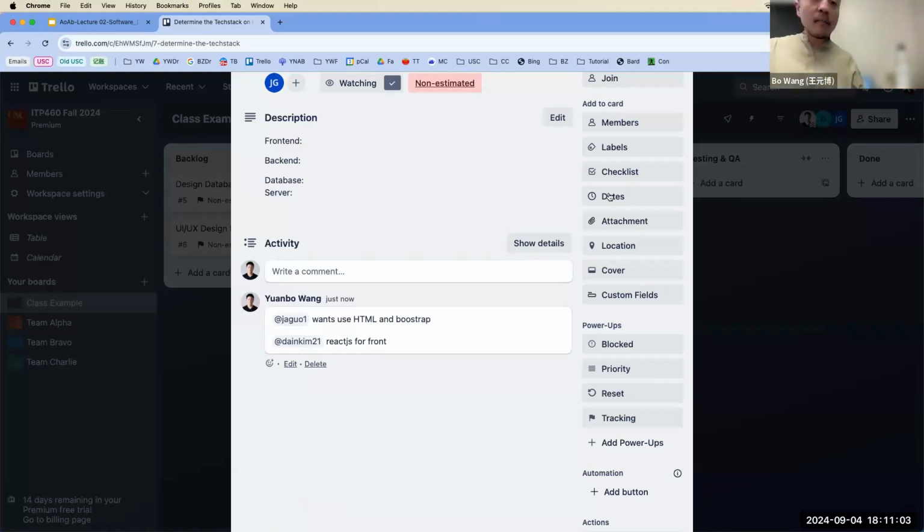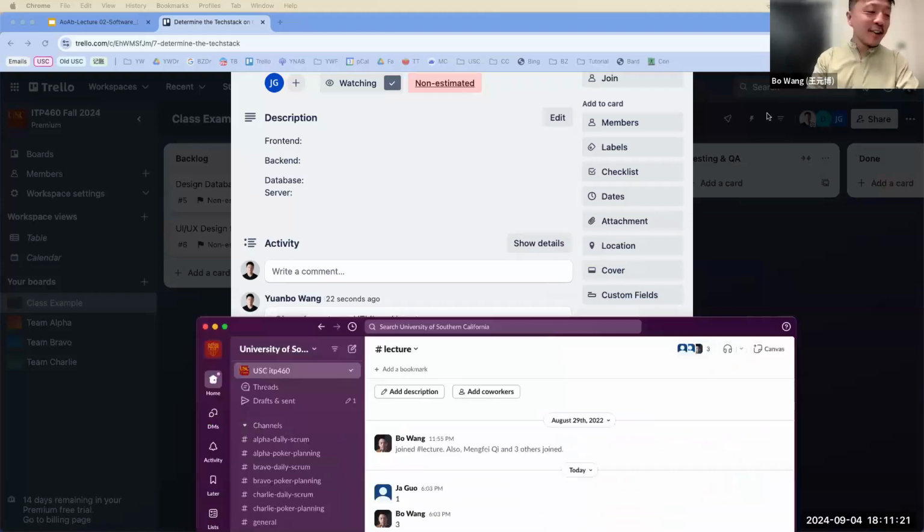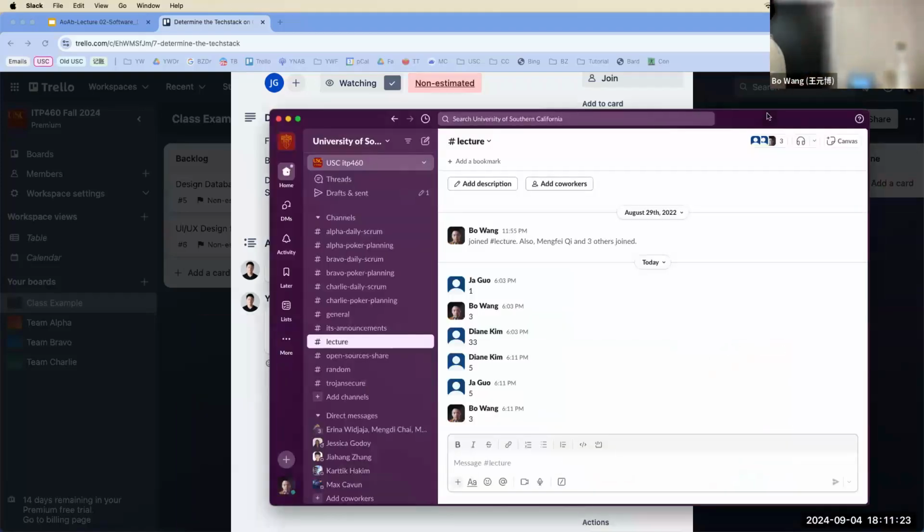So now the fun part, right? Let's estimate this task. The more you talk about it, the more details you know, and the more you understand how complex it is, right? So ready? 3, 2, Dan, well, I'll give you one more. All right, so Dan actually threw in his number before I said done, right? You don't want to give everybody else your opinion, because people just follow you, right?